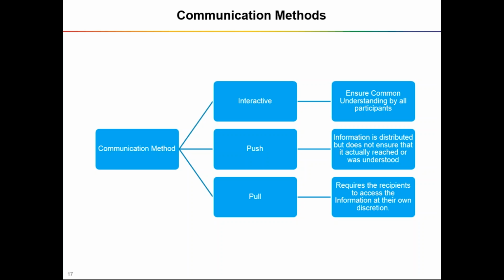Now push number of recipients. In that case, sending an email or using some electronic method is also a burden. In that case, what we do is use some wiki or some SharePoint place where we just put our report or some module, and people who want to look at that just go there, log in and pull it. That is called the pull kind of communication method.